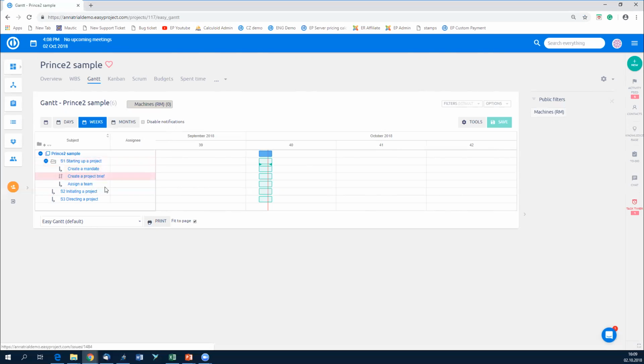There are several factors to it, which we'll talk about a bit later. So let's create relations between the stages. We have stage 1, and we will create a relation that stage 2 can only start once stage 1 is completed. Okay, you can see that it automatically moved it around. If we want, we can also create a delay between the stages, which means there will be 2 days delay before we can actually start working on it. And the same for stage 3. Then we can move it closer or further. So stage 3 can only start once stage 2 has been completed.